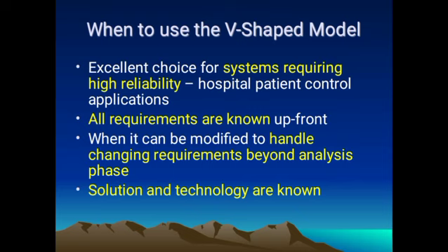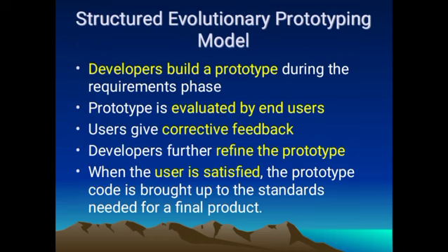When to use the V-shaped model? Excellent choice for systems requiring high reliability. All requirements are known. Changing requirements beyond the analysis phase is difficult. Solution and technology are known.